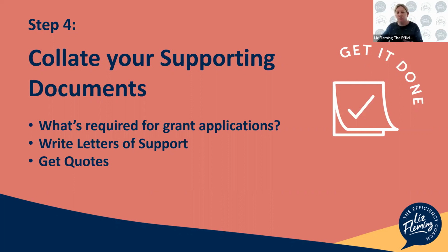So this is what's really important, to be building those relationships with your suppliers, building out who would do this project, and then most importantly, getting them to do the quote within the time frame that we've got, so that it's a valid quote to attach to the grant application, because at the end of the day, that quote becomes your budget. So if they've done a really low quote, but you know it's going to be more, you need that quote to be as realistic as possible for the time of application.